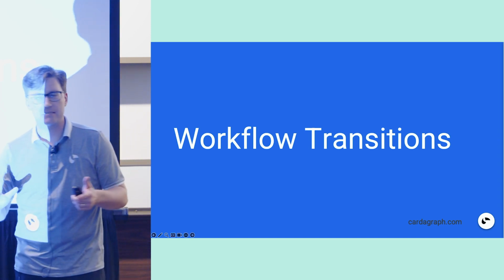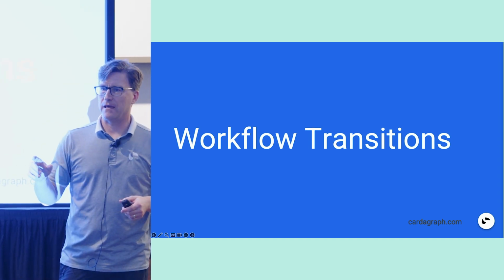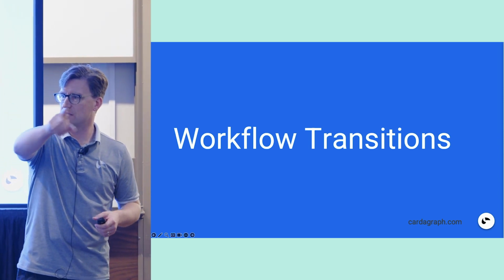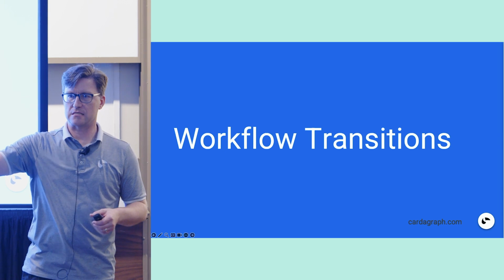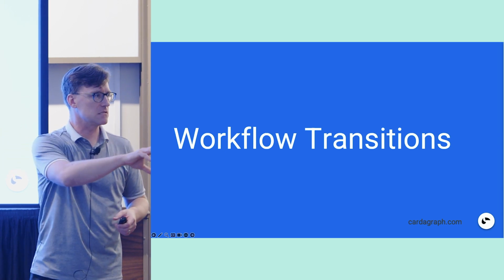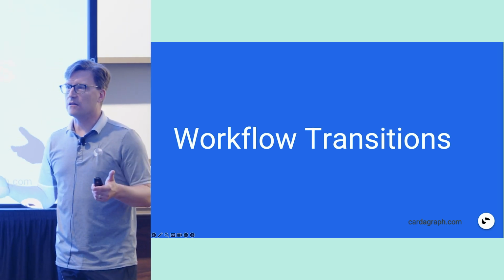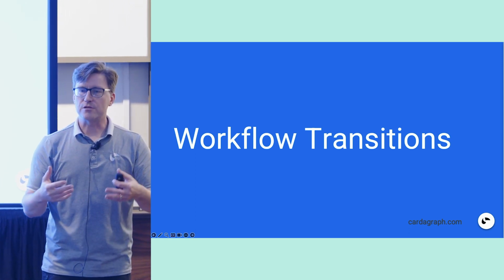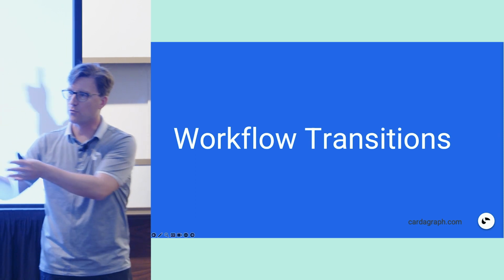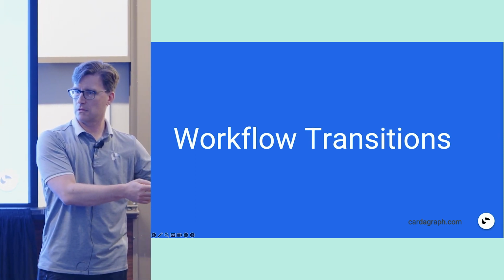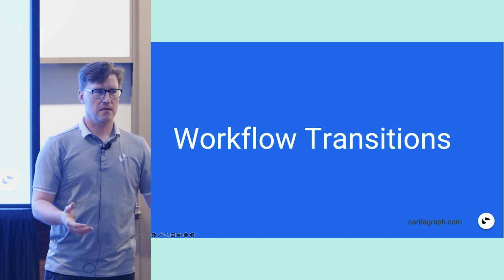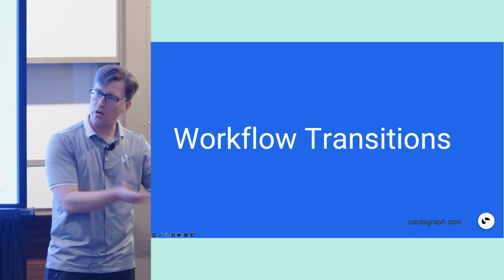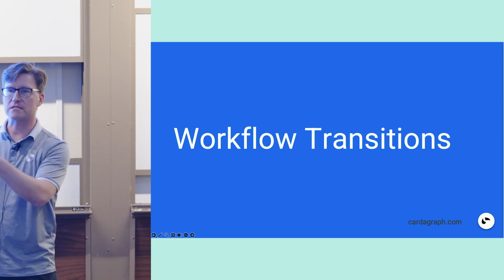And so we thought, well, hang on a second. Let's look at what we're actually measuring. Anybody here use software that doesn't have tickets go through a sequence of transitions, a set of transitions like statuses or stages or states? All of a sudden it dawned on us that we're not predicting how fast you program. All we need to look at is how fast you move your tickets through the workflow. Let that sink in for just a second. We're actually starting to look at the measure of the progress through the process instead of how hard the process seems to be for people.